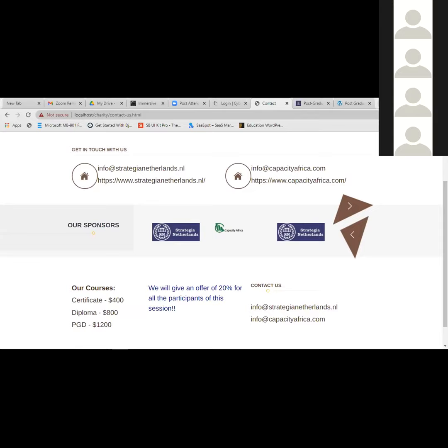So where I found unit price contracts working is, for instance, when a particular funding agency wants to fund a certain organization to make sure you participate in observing a certain day that is critical to humanitarians. Like, for instance, we have the International Day for Zero Tolerance on FGM, or we have the International Day of the African Child, or we also have the International Day for HIV/AIDS.